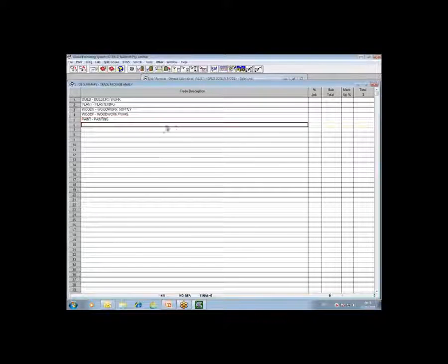So after you run an analysis, you may, in some instances, get 2 additional trades appended to the bottom. Now, I don't in this instance, but you may get an uncoded section and an incorrectly coded section. So what do they mean? Well, the uncoded section is fairly straightforward, as in the original document, you may have not coded items inadvertently.